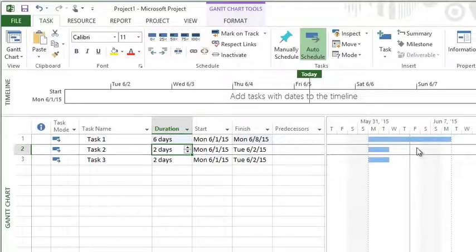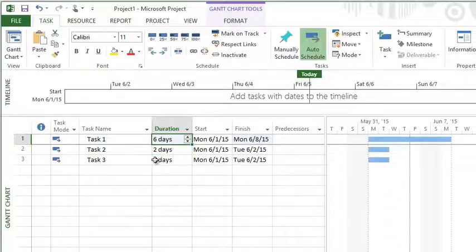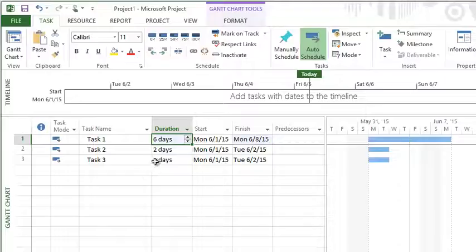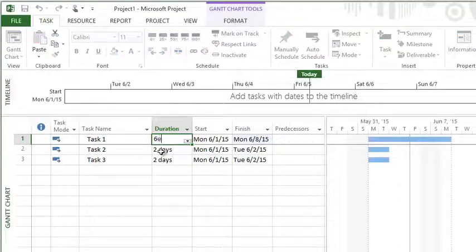Let's say that this task was curing concrete or drying paint or whatever it might be, and I don't want it to say six working days, I just want elapsed days. I want elapsed time. There's a nice little trick in Project where I can type the letter E in front of the duration unit.